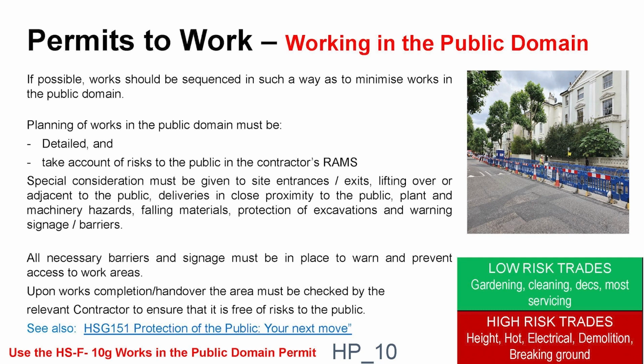So how does that affect, who does that affect? And the fact that you need to have a permit to do that. Window cleaning in itself is unlikely to require a permit, but if it's going to be done at street level, you're going to need a permit. You get it through the council and on our system. You also do need to get a permit from the council if you're going to block off the street.